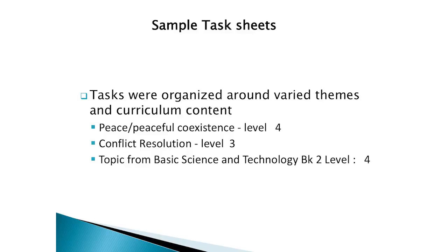Now, we organized the activities because, as I said, after our first workshop, we realized working in pairs and organizing the writers so that we can have high quality books was key, and the ability to conference with them. So what we did with this workshop, we had a task sheet for every writing session, and our task sheets were designed in such a way that we specified what theme we wanted the writers to work on, or what curriculum content we wanted them to write on.